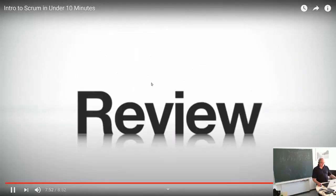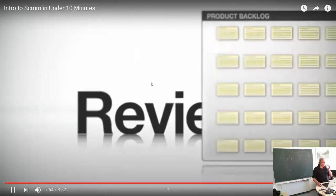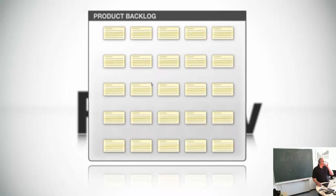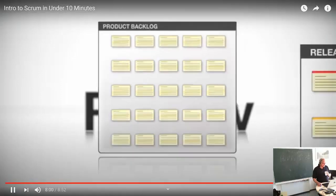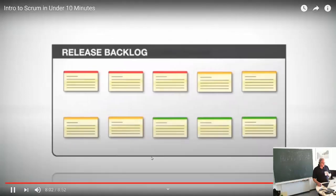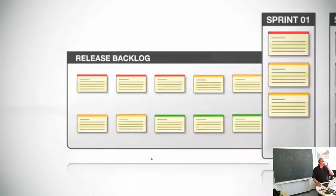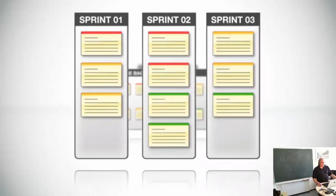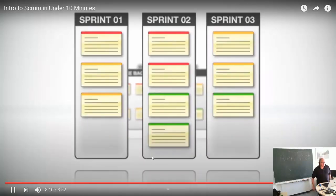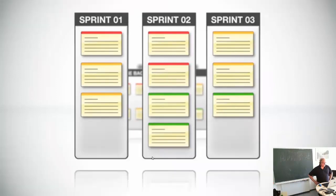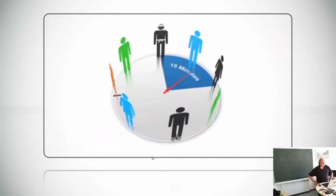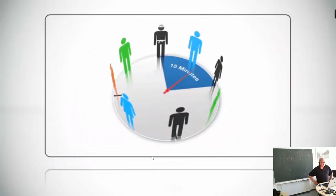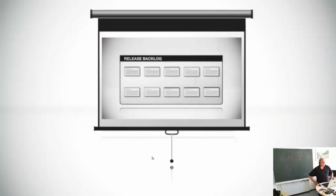So let's quickly review everything. In Scrum, you work with a product backlog, which is nothing more than a list of features that we call user stories. You then break down the product backlog into one or more release backlogs. For a given release, you further break up the release backlog into a number of sprint backlogs, which are essentially short-duration milestones throughout your project. You then monitor the progress of each sprint using burndown charts, have daily Scrum meetings to ensure everything is on track, and after each sprint you have a retrospective meeting to fine-tune everything.